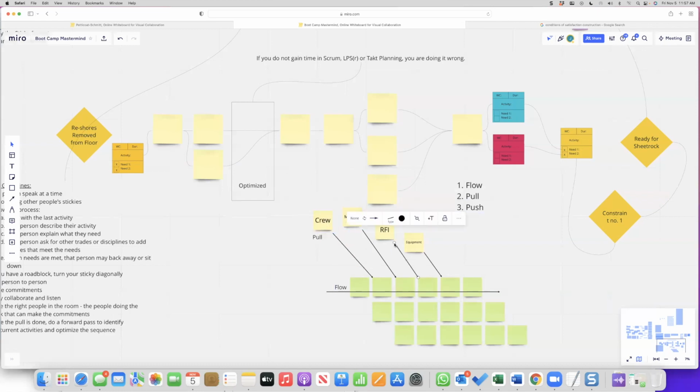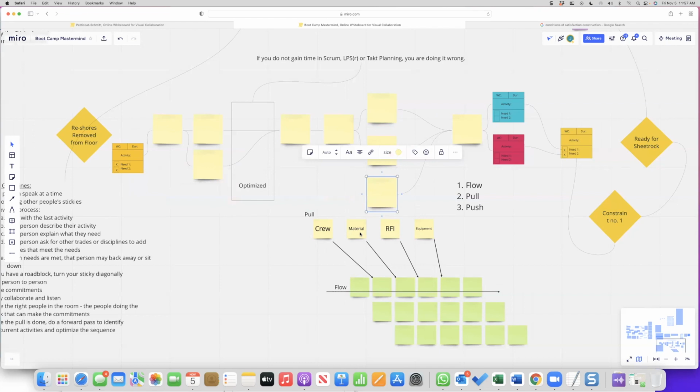My point is that in a CPM system, it's like, hey, just get everything here now. And the program itself pushes everything to the left and scrunches it together. That's an official term in case you want to know. It scrunches it together, and it will have you ordering and doing things before you actually need to do it. And by actually working backwards, we are looking at and understanding when we would actually need to do that activity, not sooner, okay?